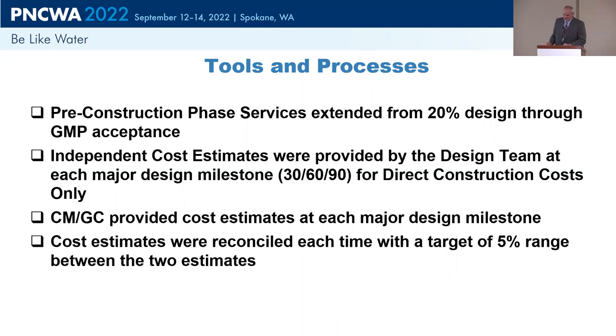Thank you, Muriel. Muriel talked a little bit about some of the challenges that STEP encountered. The driver behind all of it was the MAO, obviously, of getting done by December of 2024. So one of the first things we had to look at was how do we rearrange the project in terms of what was on critical path. That was a first step that we really looked at collectively with the contractor and the designer and the owner of what really needs to be done when and in what order. And what came out of that was the decision to break the project into various parts and pieces, right?